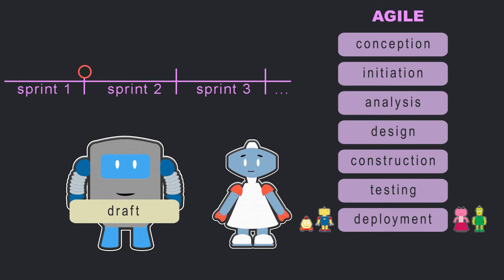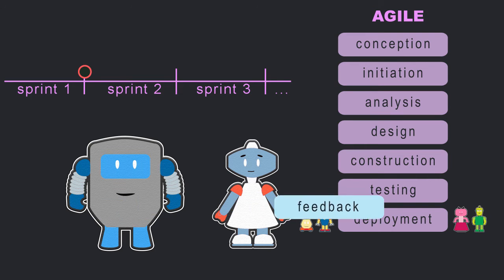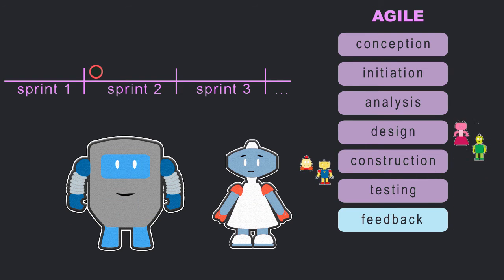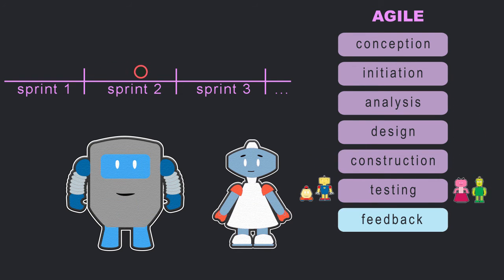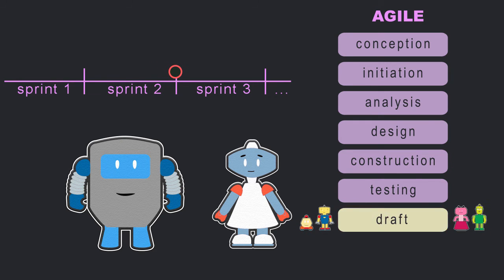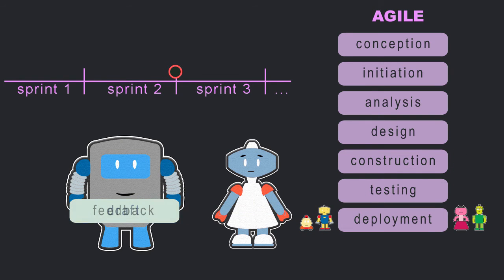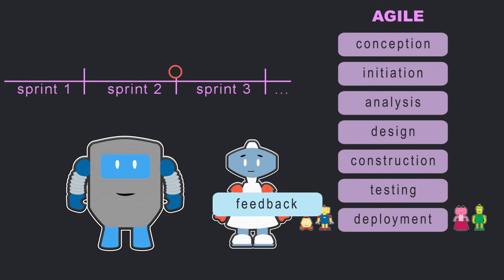The client reviews it and provides feedback, which starts the team on the next sprint. Instead of moving in one direction, agile teams repeat these steps as many times as needed to complete the project.